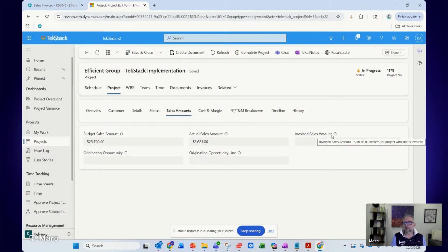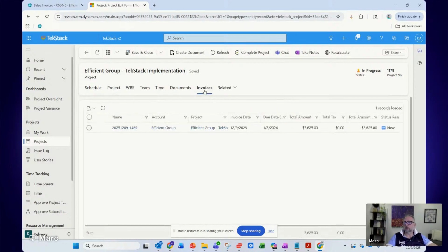There might have been some last minute manipulation on the invoice. Maybe some stuff was marked non-bill, or maybe you're billing up to the max budget, whatever. There could be a lot of things that go on between the very last time the project manager touched a time entry and the time it went out on an invoice. Well, here we can close the loop on that, and it makes it really easy for the PM to see everything that got invoiced